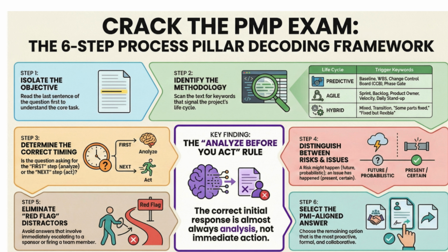So in that world, the formal change requests are replaced by what exactly? They get replaced by backlog refinement, or prioritization by value. The product owner, not the project manager, is the one who decides what gets built next. And that decision is based on maximizing business value for the customer. Your job as the PM is to facilitate that decision, remove any roadblocks, and protect the team.